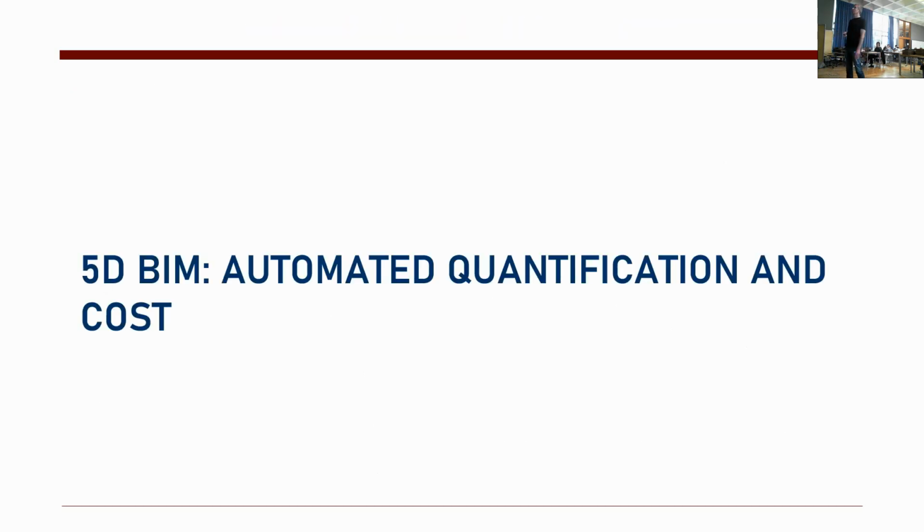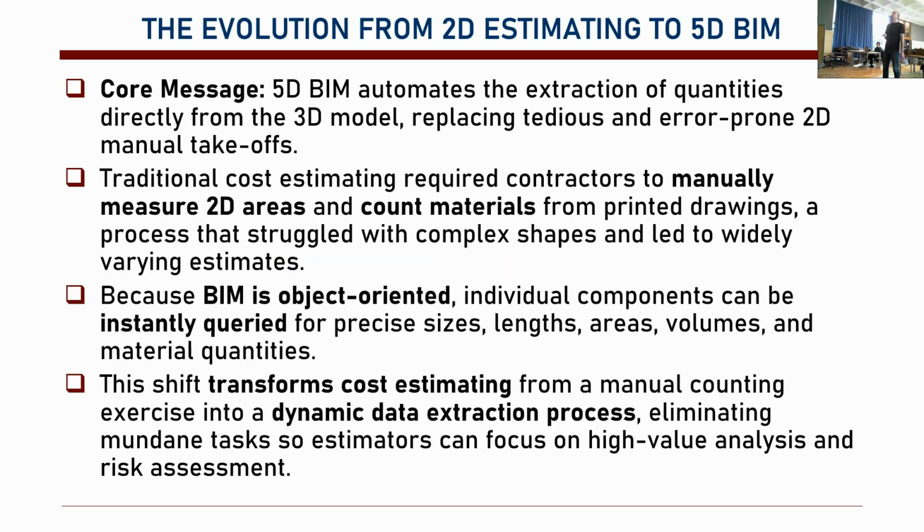So let's move into the last subject, the 5-dimensional BIM. 5D is, don't forget, the cost-oriented quantification. In 5D BIM we extract the quantities from 3D models, so that we eliminate the 2-dimensional, manual quantity takeoffs.